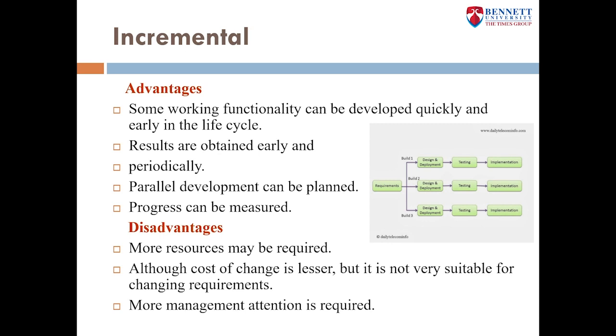Some of its advantages are errors are easy to recognize, and it is easier to test and debug. It is one of the more flexible options than the traditional or the waterfall model. The client gets important functionality early. Some of its disadvantages are the need for good planning, total cost is higher, and well-defined module interfaces are needed.